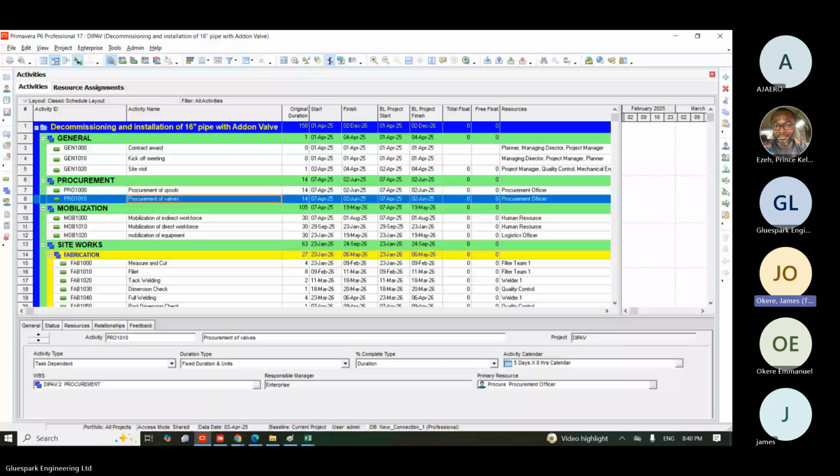If it's suspicious, just imagine you went to site yesterday, a work they're supposed to do for 10 days, they have worked there for 5 days, they only achieve 20%. Then today, you did not go to site, and they send you a report that they are 80%. It might be suspicious to you. You say, how come? These guys have worked how many days? Look at what they have done. But you won't argue with them.